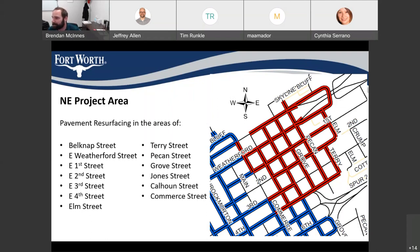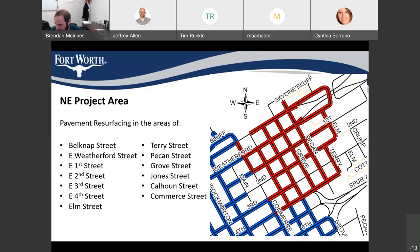A chat comment asked: would you expand on the process for sidewalk rehabilitation? Is it full replacement of the sidewalk in front of buildings? The response: the plan for sidewalk rehabilitation is to do very select sidewalks. If there are areas where, when we tie in a curb ramp, we need to tie back into the existing surrounding area to meet ADA compliance, we'll do that. We'll also look at select areas to see if there's anything that would create a tripping hazard and look at select areas like that for replacement. If that didn't answer the question, participants can respond back or unmute and ask a follow-up.